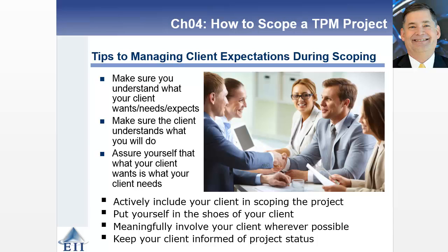One of the things you also want to do, and this will become much more apparent in one of the later videos, is assess the degree to which the client is going to be involved in the project. If the client is not going to be involved in the project, is not willing to play an active role, then in most cases you're limited to traditional project management. If the client is willing to be involved in the project, then Agile and Extreme have a greater chance of success.